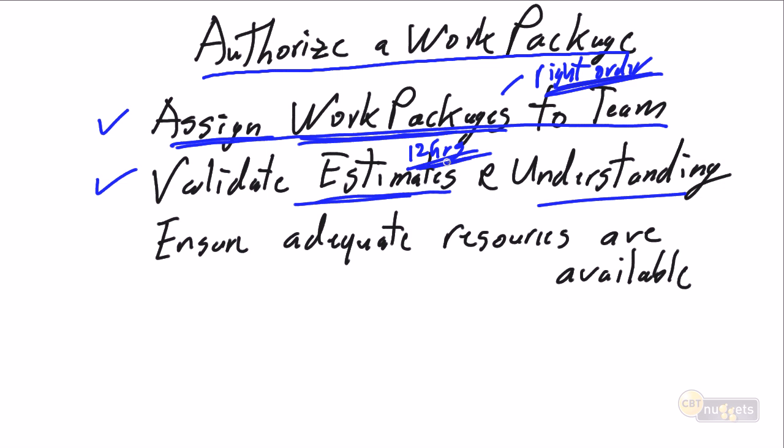And then as a project manager, you have to say, yep, you're right. Now do I have your commitment that this task can be done in 16 hours? So we're going to validate their estimates. We're going to validate their understanding to make sure they're working on the right work, and we're going to get their commitment.